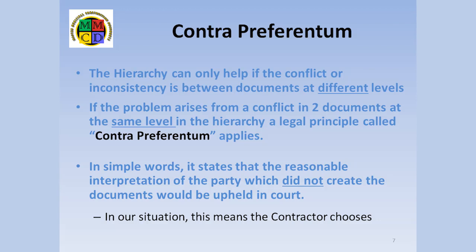Because of this legal principle, the CA cannot arbitrarily choose the more expensive option. If the owner wishes the more expensive option, then the CA must issue a change order with cost and possible time adjustments made. The reality is that the owner erred by allowing there to be a conflict in the documents, and the contractor is not expected to bear the burden of that mistake.